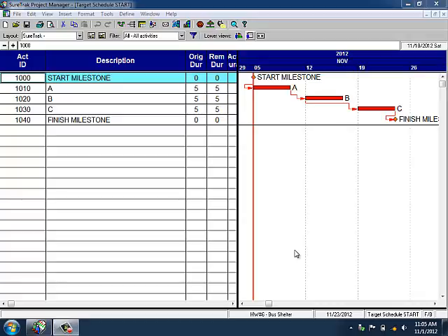And this is literally visual. You'll compare the actual bar, progress bar, to the planned bar, which is the early start, early finish bar. If you do not set the target dates, you will be unable to compare your progress with your original plan. Underline that sentence. On the front of homework 10A, it's the first thing we do, because if we don't do it, we can't go back and do it last. It is order sensitive or order specific.